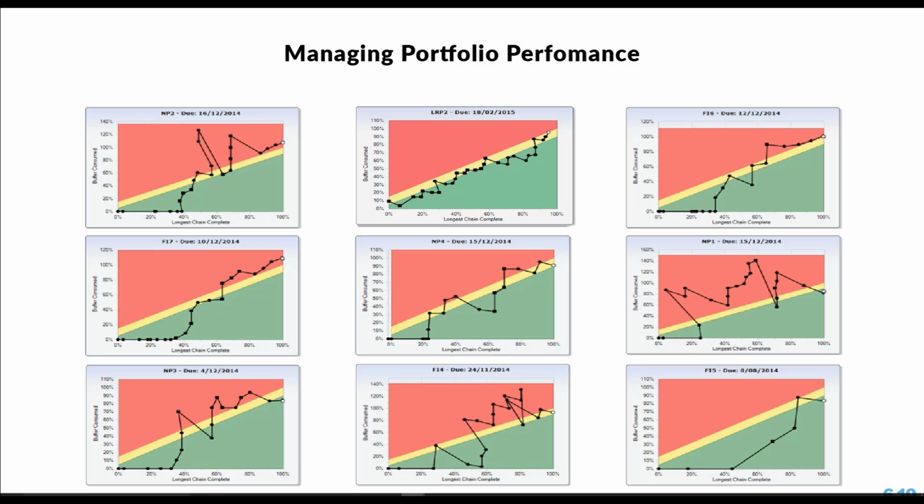In the fever chart at the top left-hand corner, we find that around the 60% completion mark, there's a violent swing up to the northwest corner of the project. This could be because additional scope has been added, or because the original duration estimates were over-optimistic. Despite that, the project team has been able to recover, not once, but twice after deep penetration into the red.